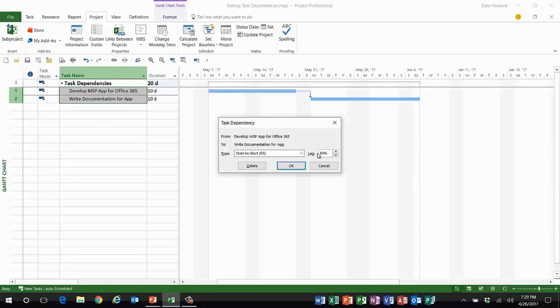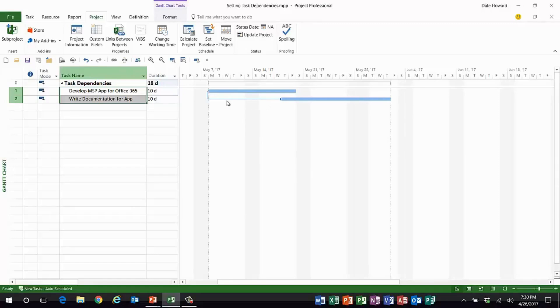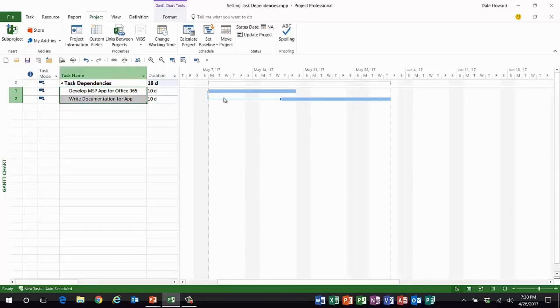So when I click OK, ladies and gentlemen, here is the task dependency relationship. The lag amount that we see here is called a calculated lag. It's 80% of the duration of the predecessor. In other words, it's an eight day lag, but it's calculated so that if I were to change the duration of the develop MSP app task, then the lag amount would grow automatically.